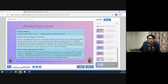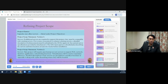Regarding refining project scope: the project charter notes that upgrades may affect servers. The project scope statement says that if additional servers are required, they must be compatible with existing servers. If it is more economical to enhance existing servers, a detailed description of enhancements must be submitted to the CIO for approval. In version 2, this project will require purchasing 10 new servers to support web, network, database, application, and printing functions, and virtualization will be used to maximize efficiency.